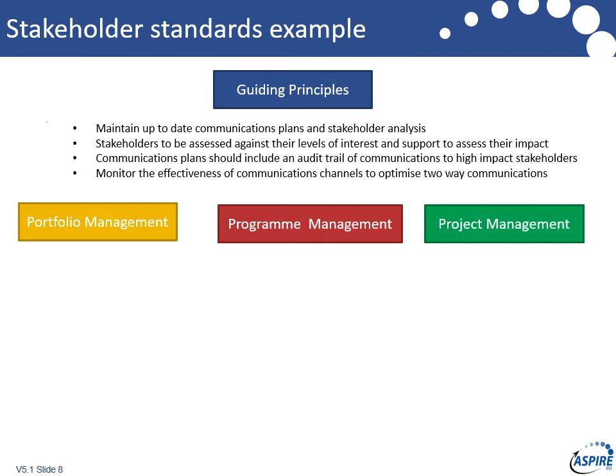If you're working across portfolio, program and project management, it could be quite a complex environment. And as you start to write them up, you realize it gets quite detailed. So it's a good idea to write some guiding principles, okay? Now the guiding principles in this case apply to stakeholder management across all three areas. Maintain up-to-date comms plans, make sure the stakeholders are assessed and you've got a tracking mechanism. There should be an audit trail of comms, and you should be monitoring which channels work best for you.